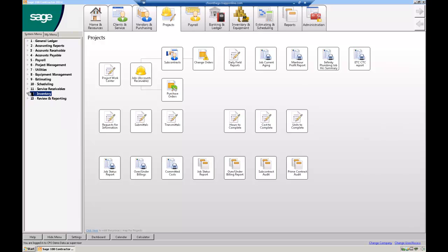So the key there is you have to make sure that people are filling out the paperwork, and that's usually where the system, I won't say fails, the system works fine. It's that the processes fail, because people take stuff out of there, load it on the truck, and they don't tell anybody. So the job gets a whole bunch of stuff for free. And at the end of the day, you have nothing on the ground, and you have a balance on your balance sheet for that location. So you've got to be careful that they do their work the way they're supposed to.